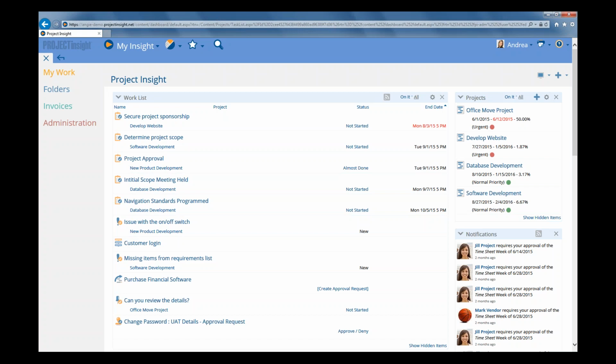Now, default work schedules can be set up at the system level to reflect different geographical areas or other common work calendars. Default work calendars are set up once and used to create project-level calendars, task-level calendars, and user-level calendars. Now, when a resource is assigned to a project, you can set what work schedule they are using: the project work schedule, their personal work schedule, or a custom work schedule set up specifically for that project. For those organizations that have task-specific scheduling requirements, you can assign a work calendar to an individual task as well.